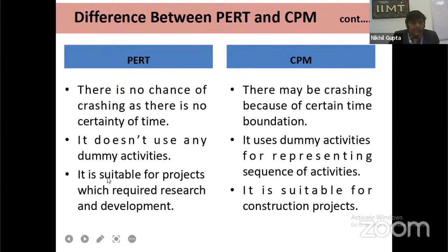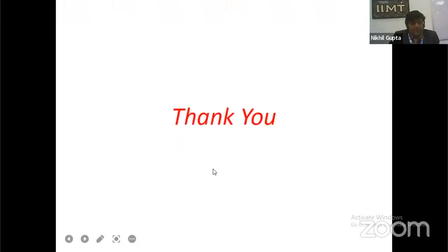PERT is suitable for projects which require research and development, and CPM is suitable for construction projects. We can say on a construction site we use CPM, and on research-type projects we use PERT. Okay, thank you very much.